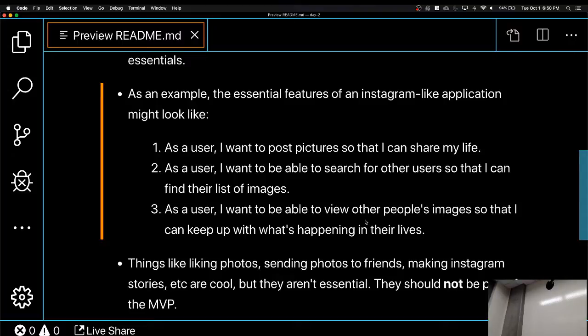So this would be one task: just create an input box. And the second task could be create a search button. So as a team, always think of smaller tasks that can be completed in at most a day. I would say a few hours, and the reason I'm saying a few hours is because the timeline is small for you guys. It's like 2 weeks and the project is done, right?